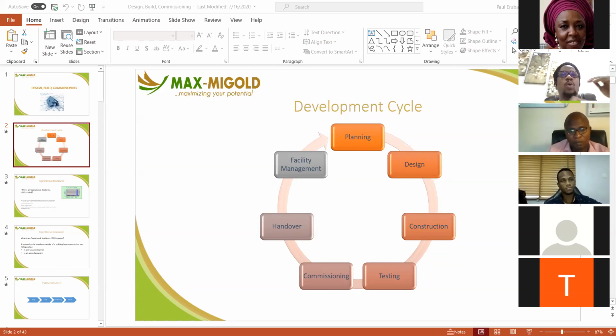So basically we call that continuous commissioning, where you are gathering commissioning data on an ongoing basis as space is being occupied. Then we also have retro commissioning, which is something you do at the point where a facility is now old enough for a renovation or overhaul or a major change, where you do that upgrade and record the difference in performance now versus before the upgrade. That's retro commissioning. So commissioning does not need to be automatic at the beginning, but don't document it as commissioning when you did not do commissioning. Leave it blank, but it's not done.